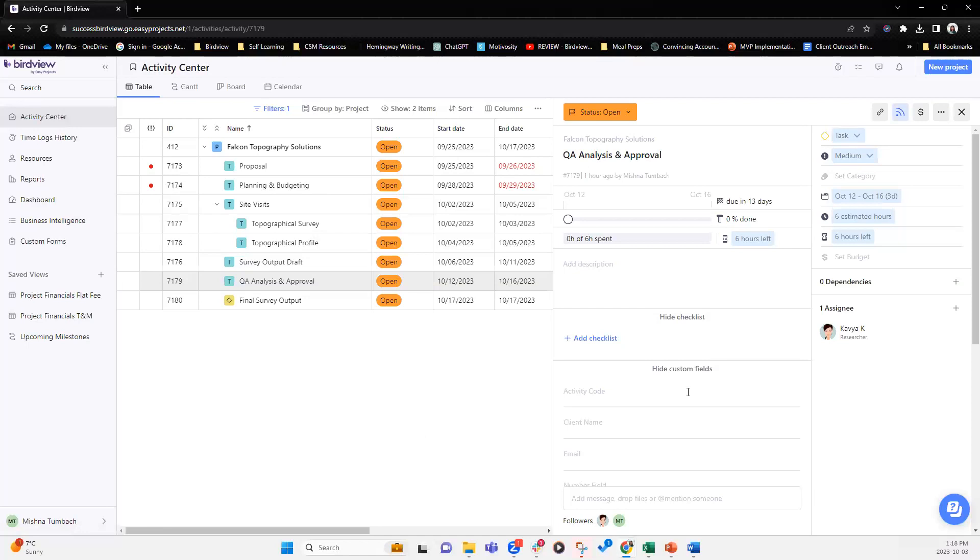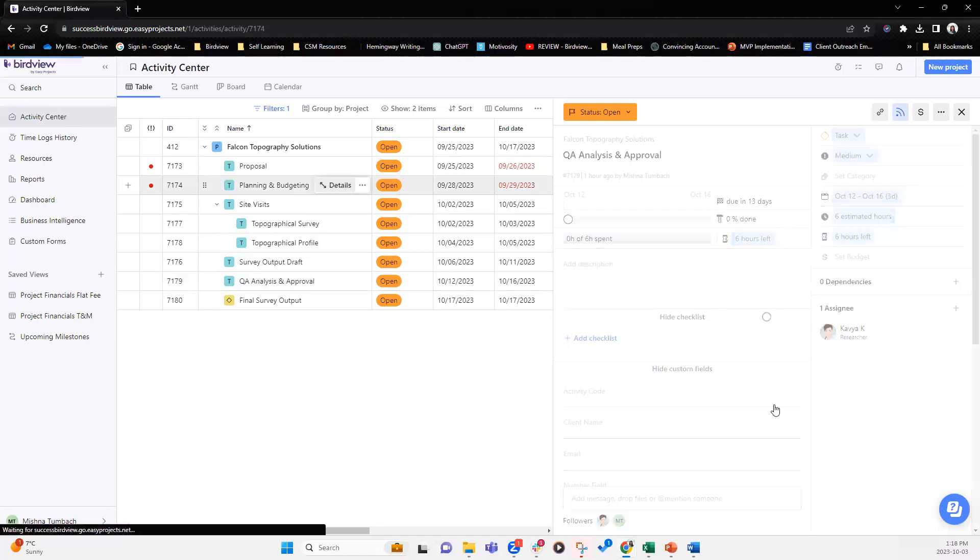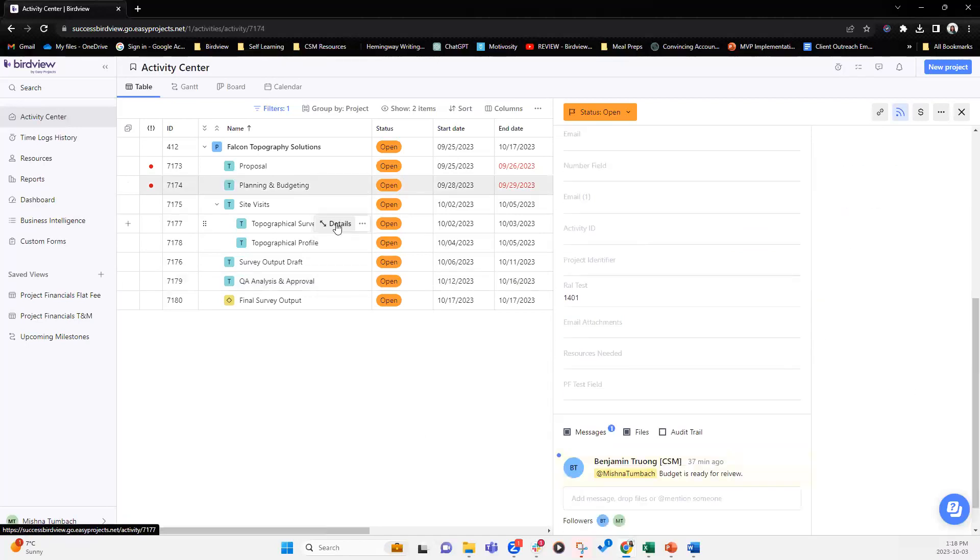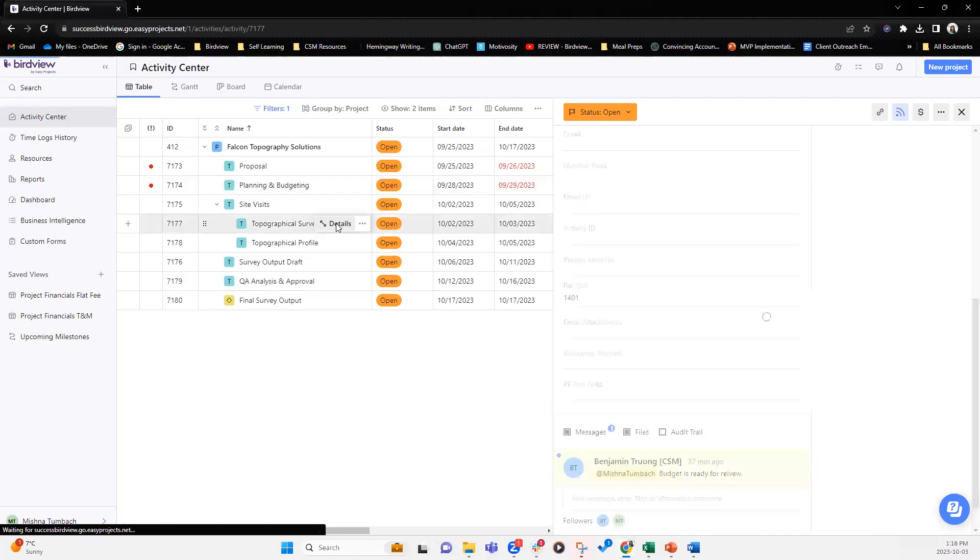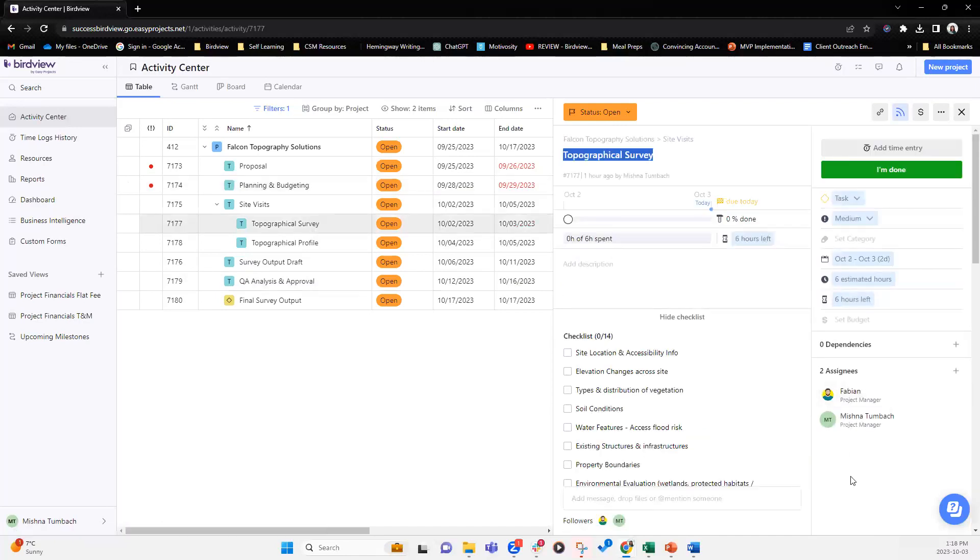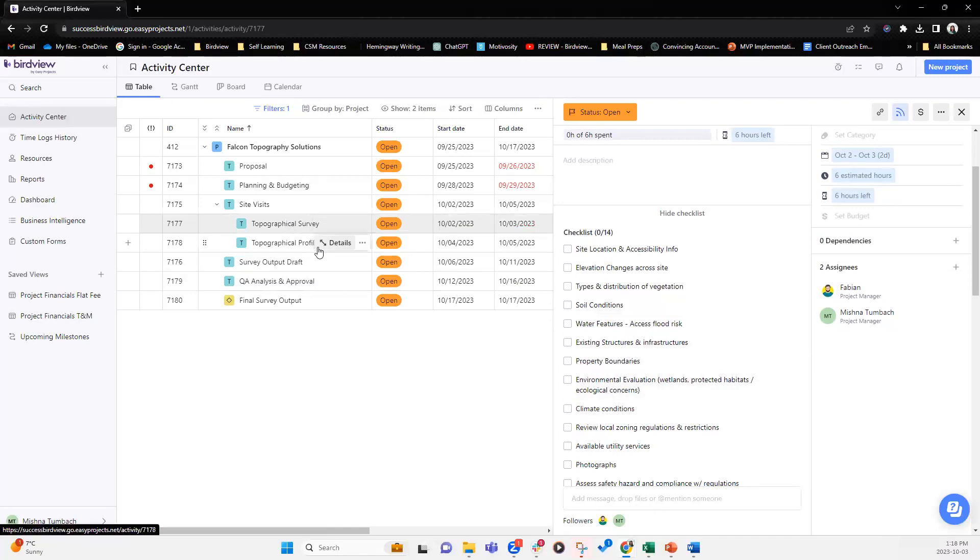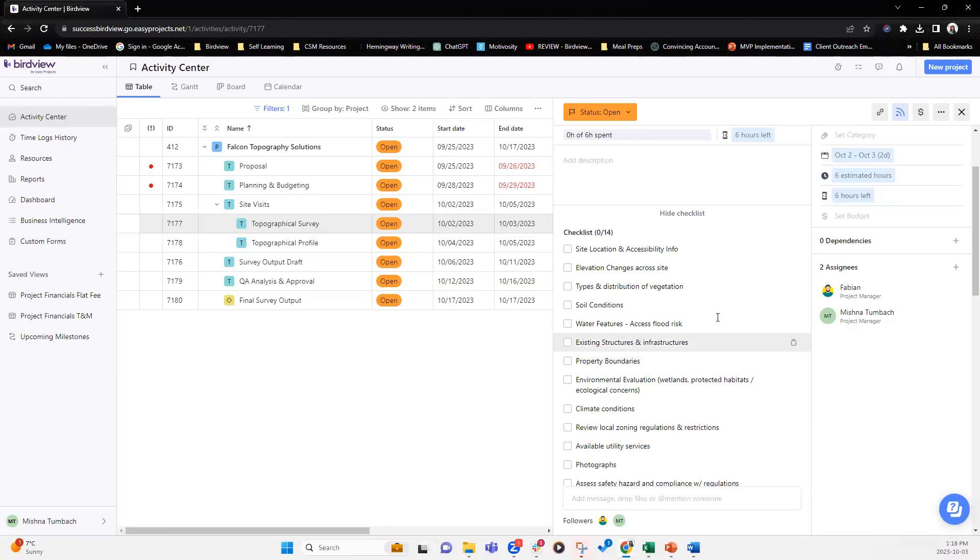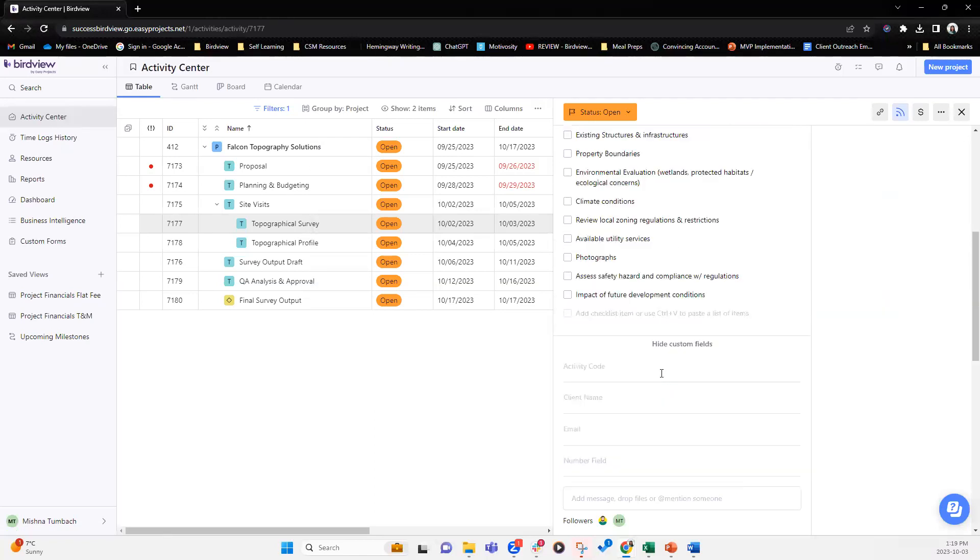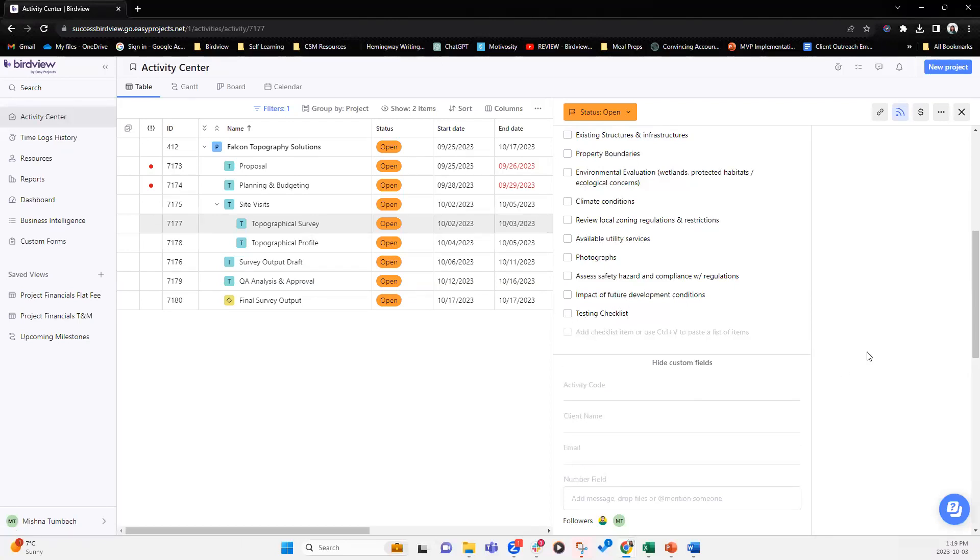Checklists. So let's talk about a checklist, which is our newest and coolest feature. Let's say you're a surveyor and you want to be sure that you have checked off every single thing that you need to take care of when you're out on the site. Before, what you would do is you would probably go and create multiple sub tasks or child tasks to make sure all that information is captured. However, with the introduction of checklist, now you can see it all in the project or the task details section. So how do you add a checklist item? Simply click on where it says add checklist item or use control V to paste a list of these items. So I'm simply going to click and say testing checklist and hit enter.